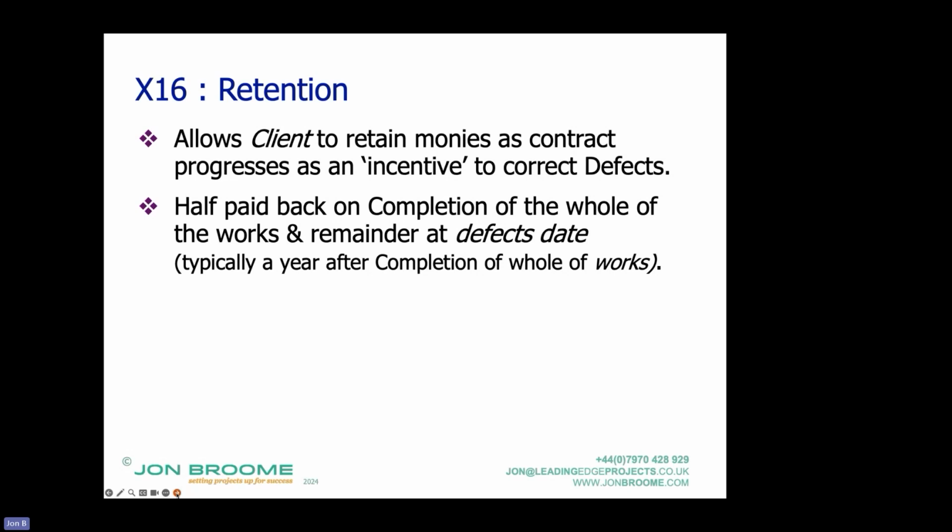Retention is much maligned, with some justification, because it's much abused. People keep the money back and then say, oh yeah, but we're not actually going to pay you back. Or they keep the money back and then, as with ISG, they go bankrupt or insolvent, and the people don't get the money and so on. So there is a fairly strong campaign to get rid of retention.